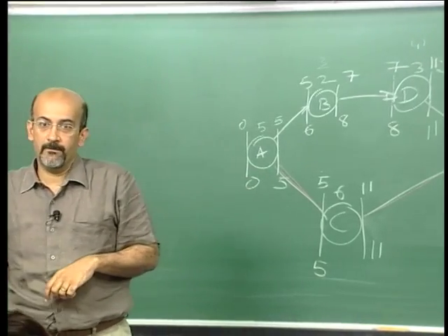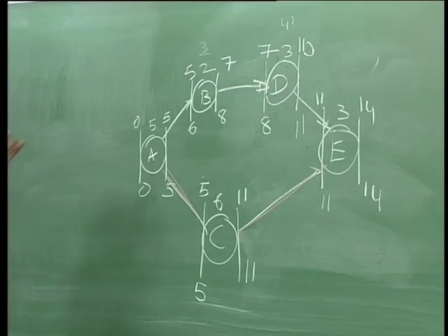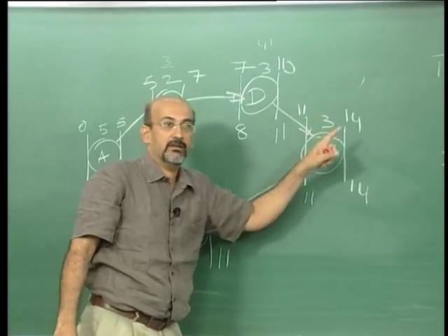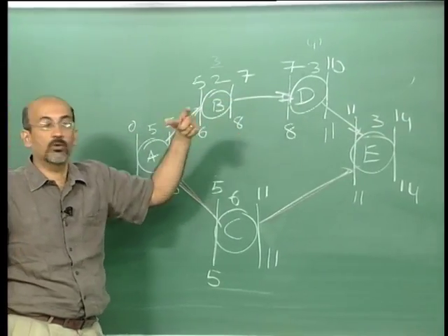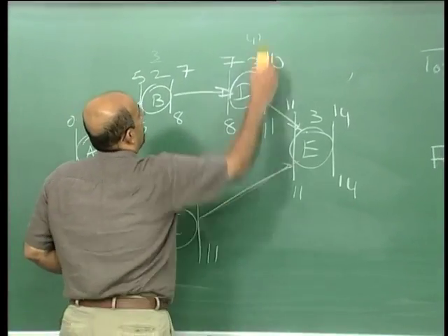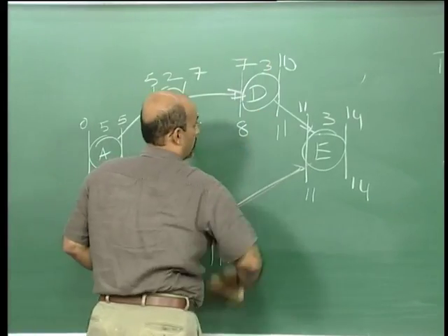What will happen? Yes, the whole project gets delayed by 1 day, because that float is shared. The minute one of them uses it, it goes off the network. So we have to be aware of shared float.